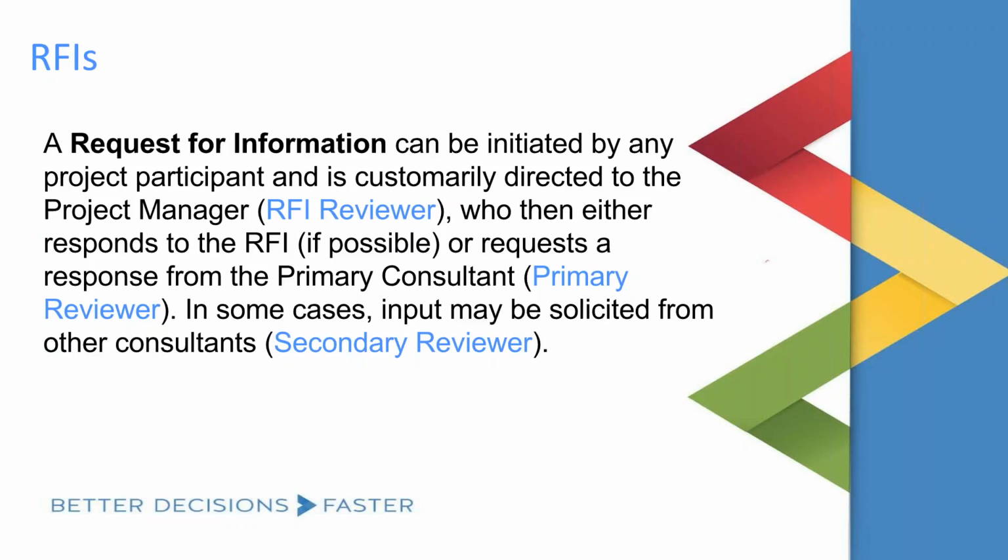They can respond to the RFI, or they can request a response from the primary consultant. The primary consultant in Gate 3 terminology is called the primary reviewer. And in some cases, Gate 3 does provide you the opportunity and flexibility to further solicit answers or clarification from other consultants, and this would be called a secondary reviewer.